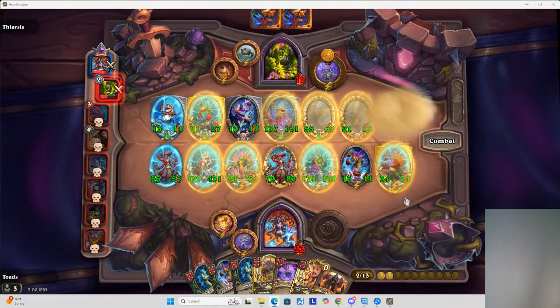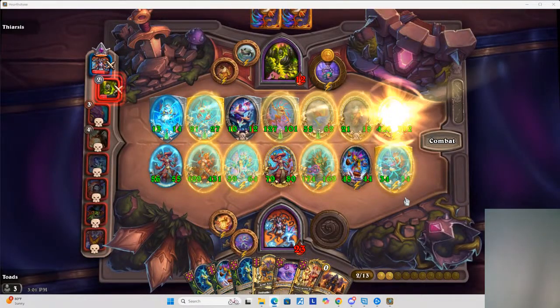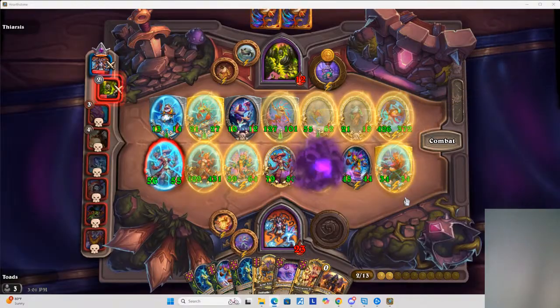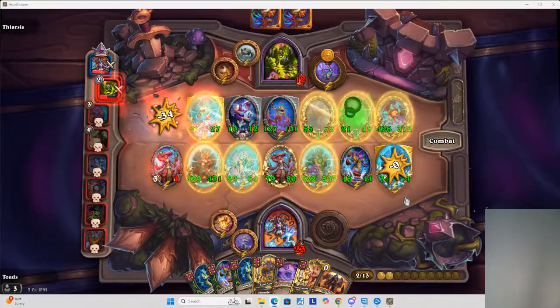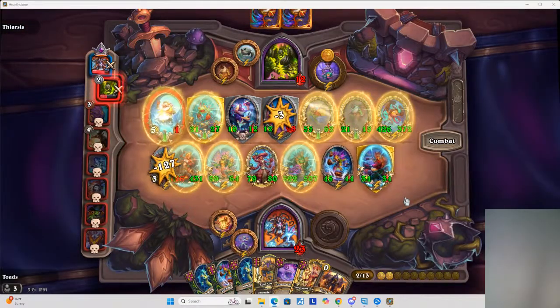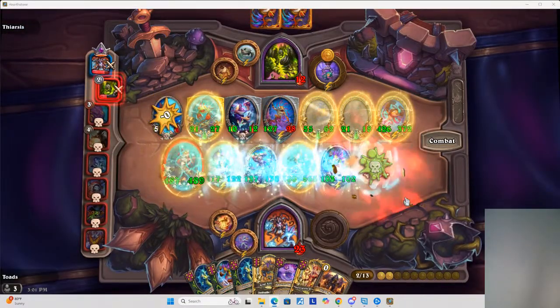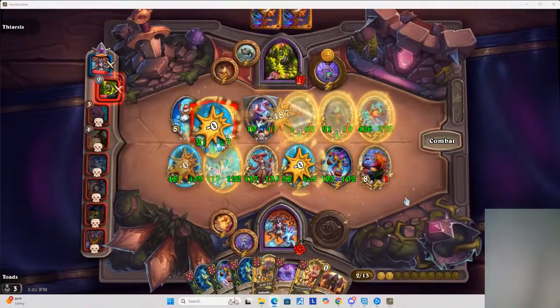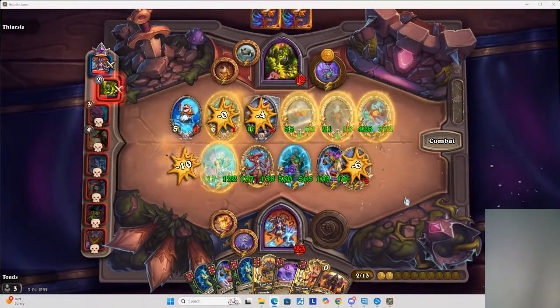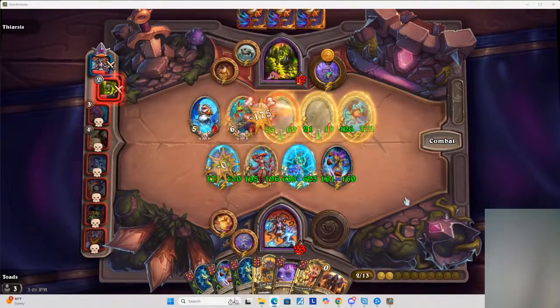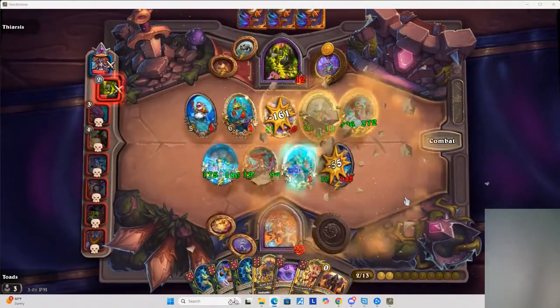The construction permit is 10 days. Build out space is 10 days, and approved build out is 1 day. That all adds up to 27 days. Adding up all the IT installations is another 11 days, so the total path is 38 workdays, about 7.5 weeks.